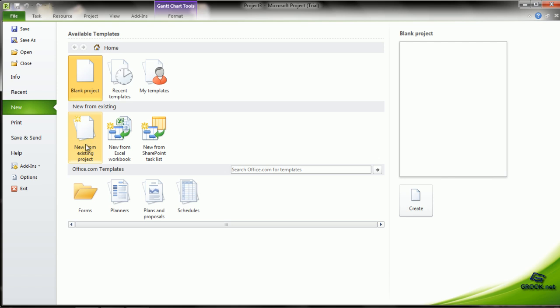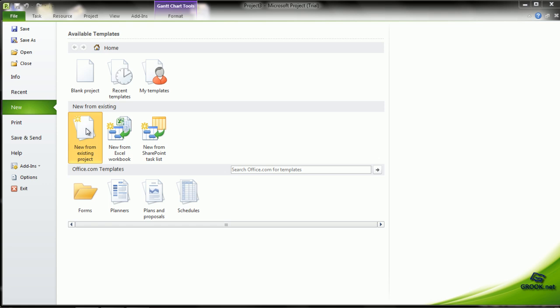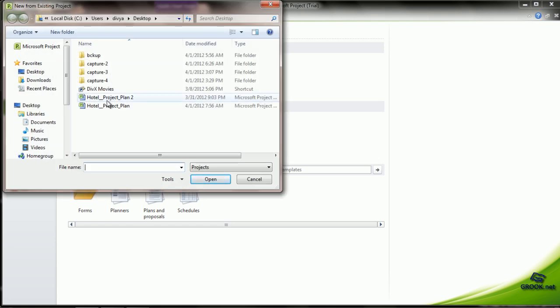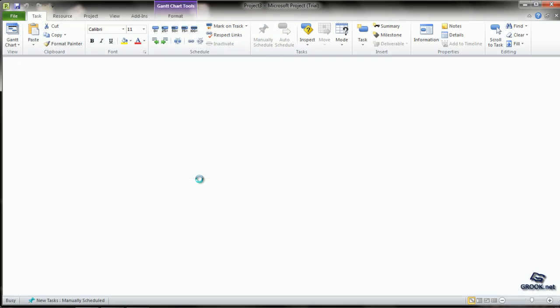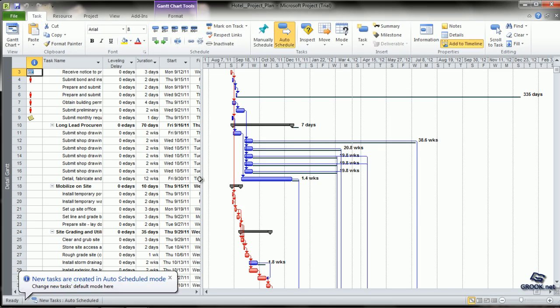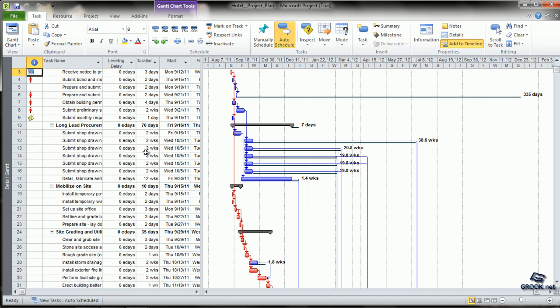So we click on New from existing project and browse to where our project is and we say Create New. This makes a copy of the existing project and we can edit whatever information we want to customize it to our new project.